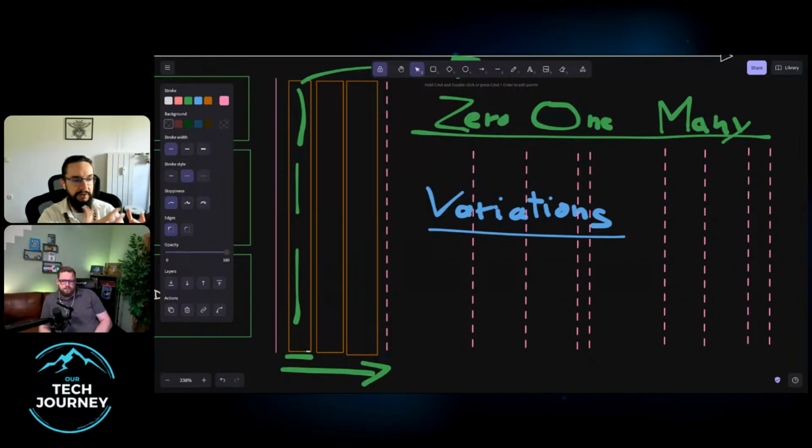And that's what vertical slicing really leans into. Vertical slicing is approaching the problem space as, you will change your mind, so let's keep the entire team synchronized between two events of changing your mind on anything in the product. The design might change, or there's a budget for each layer, and the further we go right on the timeline, the less budget we have left for the last layer, right?